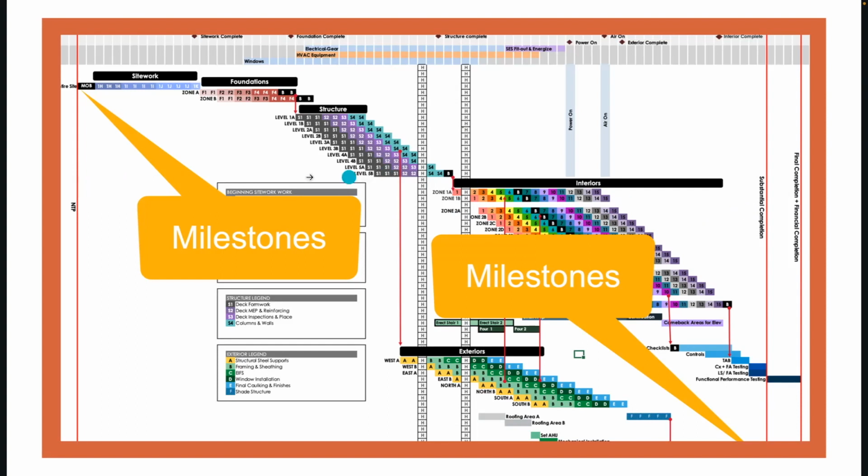Another way to do this is to have a start date and then to, based on the local, regional resources, the availability, the trades, and the durations that are common to your local area, go build a Takt plan and structure it, and then tell the owner when we can complete the job and make sure that we have a correct overall total project duration.